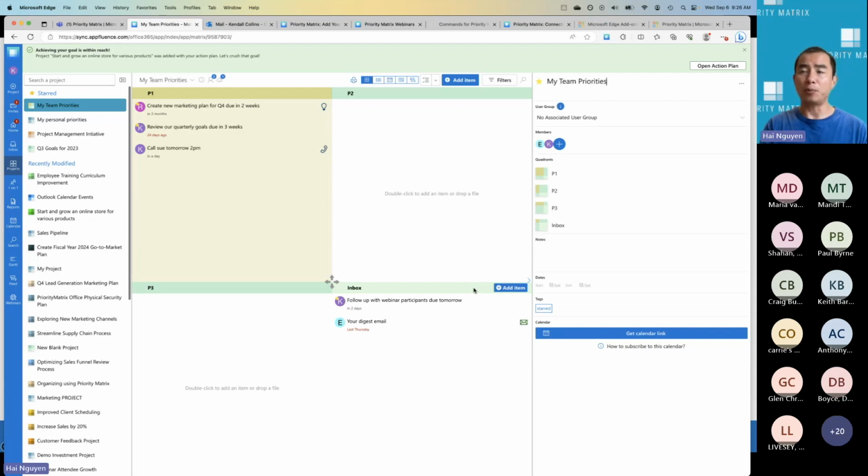So when you create a Matrix project and you create all those different tasks, so for example, task 1 due in one day, task 2 due in 1 week, task 3 due in 3 weeks, and then a quarterly follow-up, etc. You can save that as a template. And then when you have a new client, you launch from a template instead. You can say this client will start on October 1st, and then everything in Matrix will be created for you.